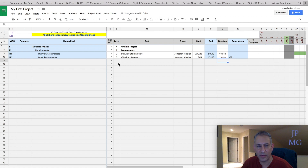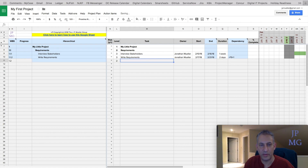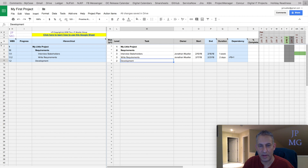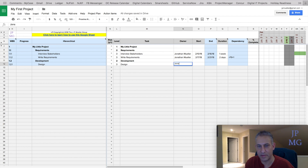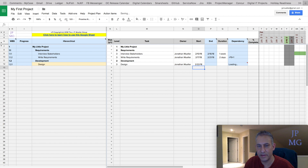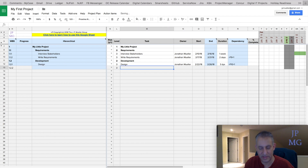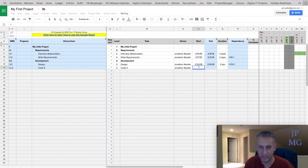Let's add a few more things. We'll go back to level two and add "development" as a parent task with no other data. Then we'll put a level three child called "design," assign it to myself, and make it start after the previous task ends plus one day — let's make design three days. Then we'll add another task at the same level called "code," assign it to myself, make it start after design is complete, and call that two weeks.